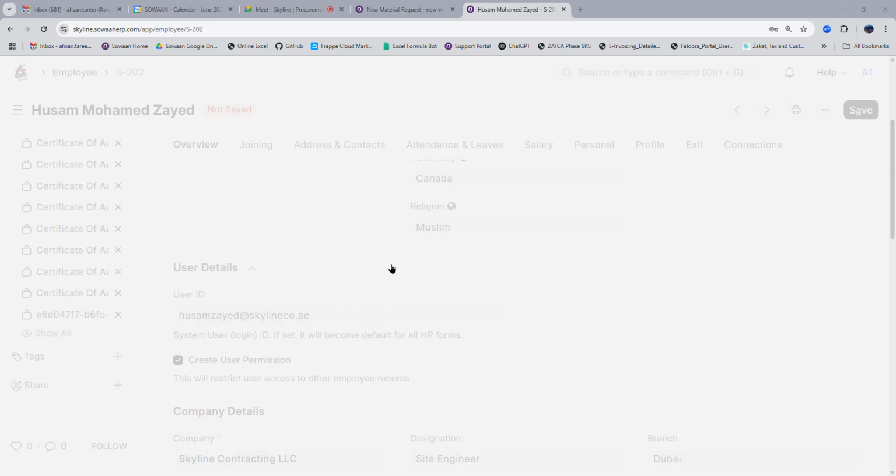So your BOQ team, the quantity survey team, will create them, and you are not supposed to be creating them because BOQ is your first document and it has everything, the child items, the parent items, and everything in it. And based on what you define in your BOQ, the single items and the bundle items, all the combination of these two are already there in the BOQ.